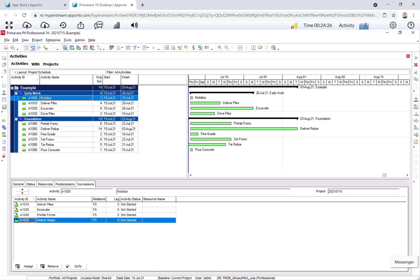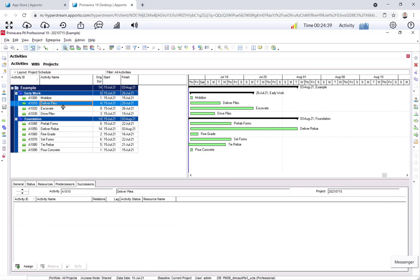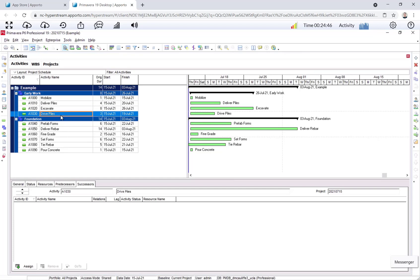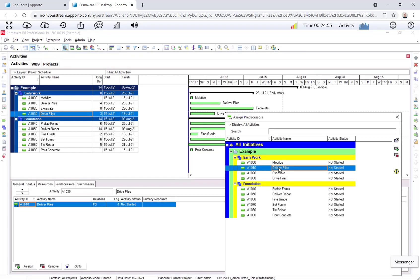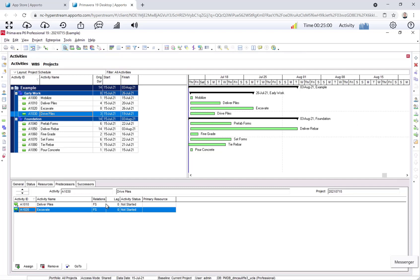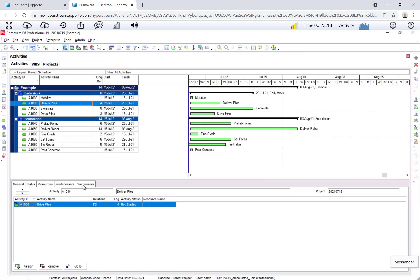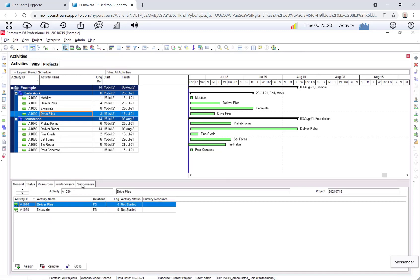We'll keep working down the list. Next, in our network diagram, we can see that drive piles is a successor to both deliver piles and excavate. So two ways of doing it. We can go to deliver piles and assign the successor, and then go to excavate and assign the same successor. Or we can go to drive piles, click the predecessor button, and assign the two predecessors to drive piles. So we have deliver piles and excavate. It works both directions. For beginners, I recommend picking one mode and just going with it.